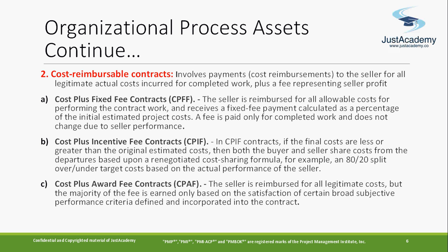So whenever an adjustment happens, it is just like a sharing formula. If the cost increases more for the services or product that you are purchasing, or the cost of that material increases, or the services they are providing cost more, in that case they will say, okay, I will bear this much extra amount, 80%, and you will bear 20%. So that's called an 80-20 split formula.